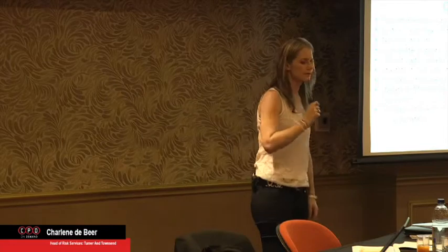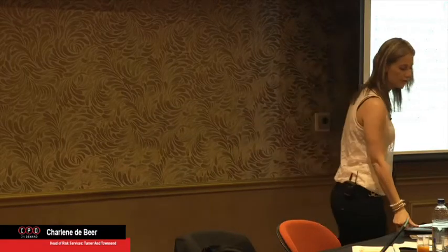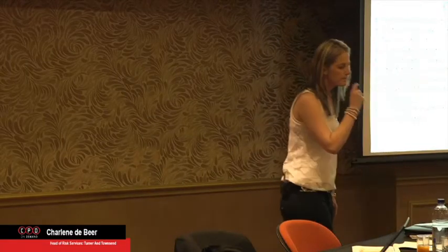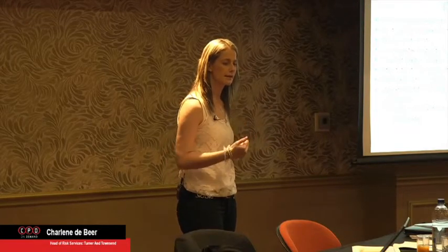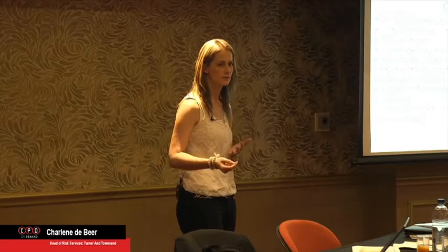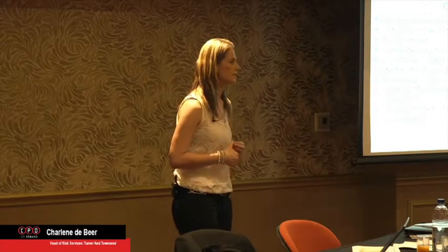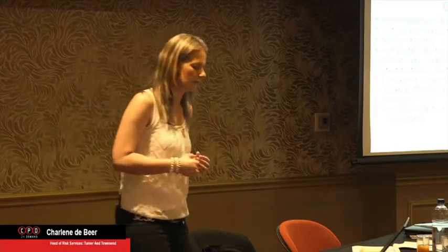So we say attention to inclement weather in base schedule. What that means is don't double dip. So if the contractor contractually has the right to provide for 1.5 days inclement weather a month, then you must take that into account in your risk. So either in your risk session, you said, well, we're going to overrun schedule by 2 weeks. Ask, does 2 weeks take into account 10 days of weather already, or is it an additional 14 days or 2 weeks?